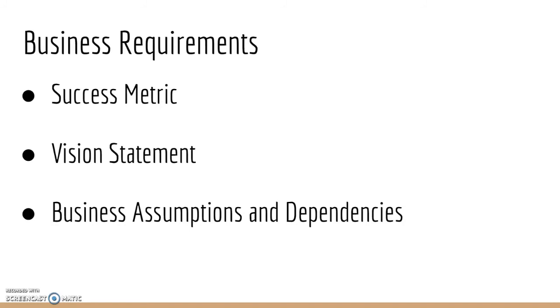The business requirements, the success metrics. SM1 is going to be within 3 months of the initial start. There will be a 50% increase in bookings. SM2, within 6 months of the initial start, there will be an 80% acceptance rate as the process will become secondhand knowledge.